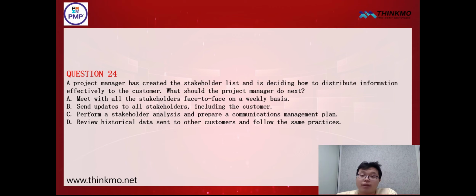Now, as for option D, the main issue here is actually about what? That is, letting the client know that these new features will be added later is not a problem. However, as for exactly at which stage they'll be added or where they'll be added, no decision has been made at this point. So actually, this is why option C is included. Putting it on the to-do list is actually more reasonable. As for when exactly to do it, for now, let's just set it aside, and later on we'll plan out the specific implementation stage and timeline.